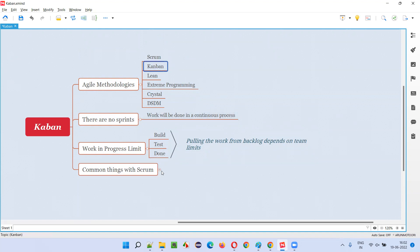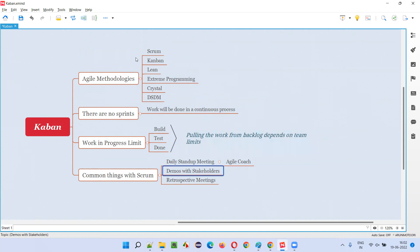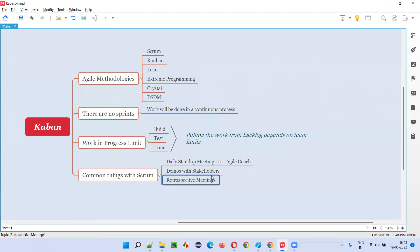There are some common things between Scrum and Kanban. Daily standup meetings happen in Kanban too, but in Scrum we call the person who conducts them the Scrum Master, while in Kanban we call that person the Agile Coach. Also, demos with stakeholders will be there — items move to done only after demonstration. Retrospective meetings also happen in Kanban, where the team self-improves and checks how good their work is.